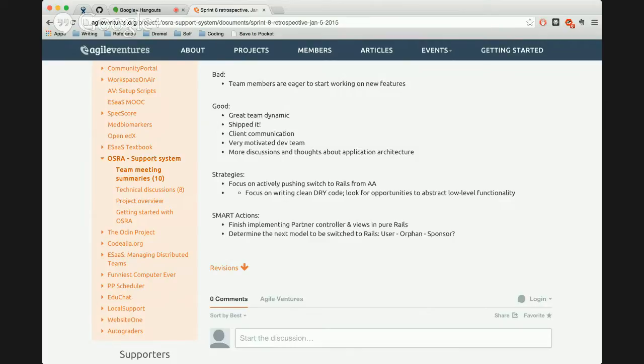So I think you want to sort out that import stuff, the changes I'd made, Nick, before starting on the pending orphan list, Active Admin, because they're very much connected there.